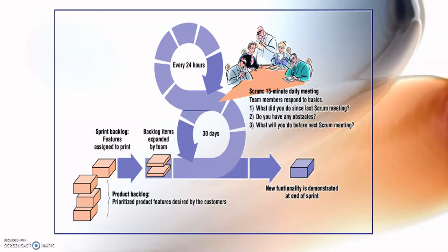Three quick questions are asked and answered by all the team members. So what are the three key questions? What did you do since the last team meeting? What obstacles are you encountering? What do you plan to accomplish by the next team meeting?